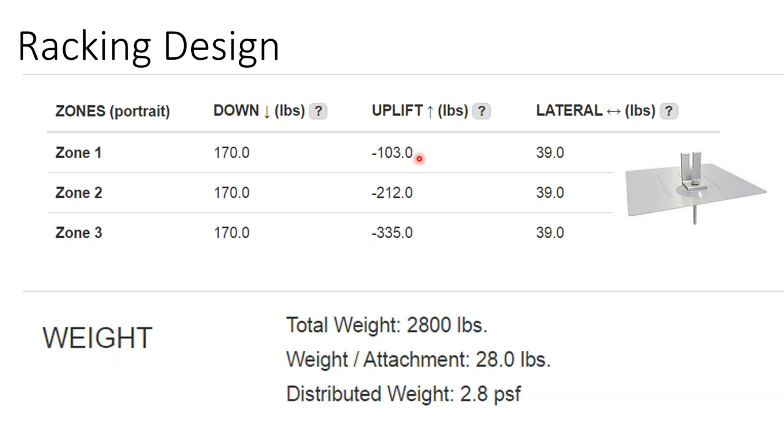So we have a question: for a rooftop retrofit, is it a recommendation to always involve a structural engineer? I usually leave it up to the client. The way that the larger solar companies seem to be doing it is they look for deviancies or deficiencies in the roof truss during the site evaluation. Essentially, if it's a 2 foot on center pine truss and you're using hurricane clips to attach the truss to the building walls, they're not going through the structural review process.